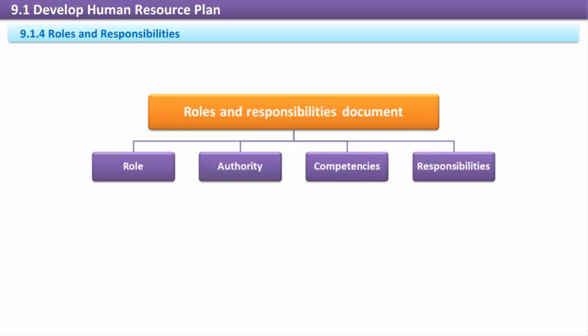Including the project team members in defining or replanning roles and responsibilities is a good idea because it helps foster commitment to the project by involving the team members in defining their own roles. Changes to roles and responsibilities are common throughout the project, especially as the project staff is acquired and roles are filled, because a person's skill set may not exactly fit the competencies as originally planned for, so roles and responsibilities may expand or decrease. Staffing changes, such as unexpected leaves or absence, may also result in modifications to roles. The Roles and Responsibilities document should include all unique roles from the activity resource estimates, including project management roles. The format is not important as long as it clearly describes the position, authority, competencies, and responsibilities of every project role.